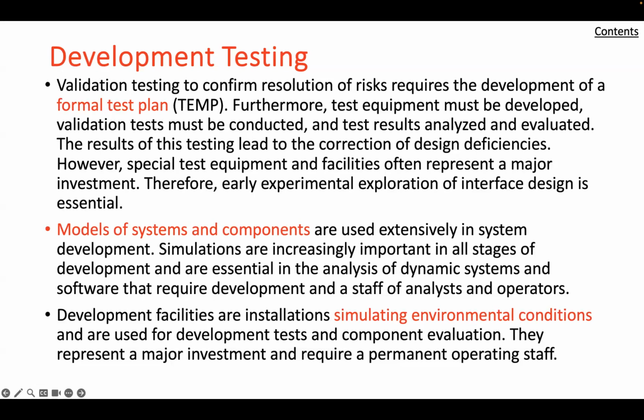So in terms of a checklist, we can be thinking of a few things. One, determine the objective of the test program. That would be important. The primary purpose, of course, is to test the subsystems and system against a selected set of operational and performance requirements. And so that would be something we want to do. Two, review the operational and top level requirements, determine what features and parameters must be evaluated. Key performance parameters identified early in the development process must be included in this test.